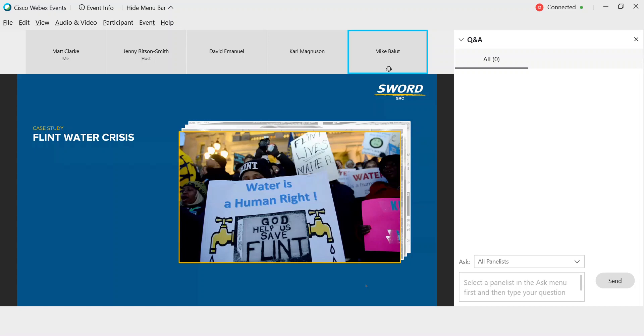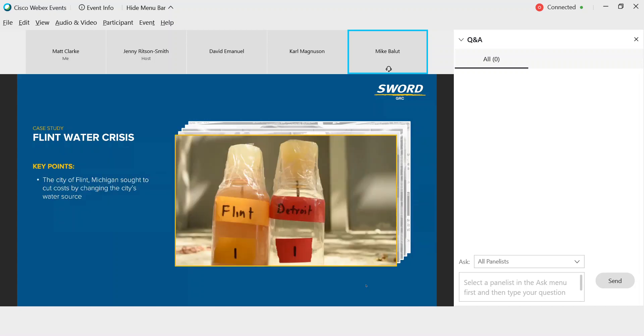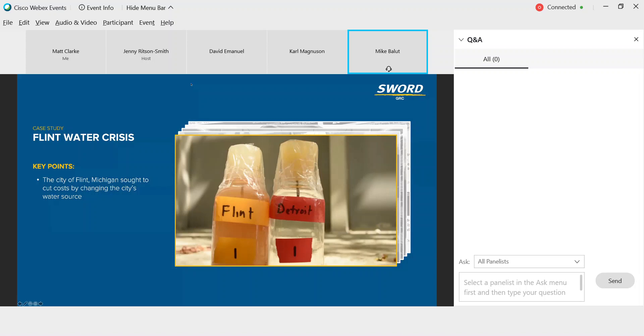The Flint water project was initiated by the emergency manager who was charged with handling key business decisions for the city of Flint, Michigan. The sole motivation for this project was to reduce costs to the city, which due to declining economic conditions was considered insolvent. The project was to change the drinking water source for the city to save $5 million per year. Unfortunately, the desire to cut costs was so strong that officials within the Michigan state government and the Department of Environmental Quality ignored early claims and clear evidence from the community that the water contained high levels of lead. Doesn't take a scientist to see from this slide that this water is not something you'd want to drink or use in any way.